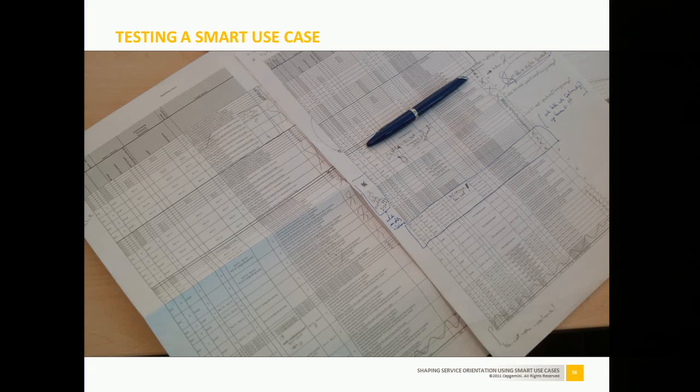I had a discussion earlier this week with somebody who said, what's the correct ratio between developers and testers? And he said, well, we have about 4 to 5 developers and 1 tester. And I would say, well, I would much rather have 1 tester per 2 developers, or maybe even 1 on 1, because it's an enormous amount of work if you want to do testing right.